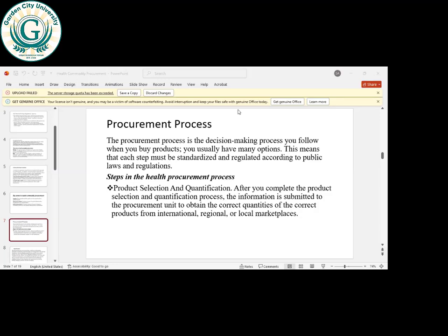You know, in contracts, whenever you award a contract, you look at the worth of the contract. So there were people who got contracts, but they didn't have the financial muscle. Assuming I'm giving you a contract worth $10 million, and they evaluate your company, your equipment, the assets, and everything is around $1 million, then you don't qualify to handle that contract.